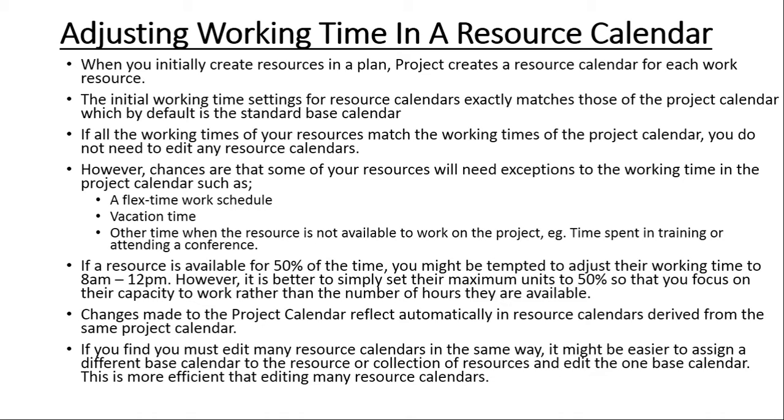So if you assign a specific calendar to a project, all the resources that you create also automatically get a calendar assigned as well. So in other words, project is going to create a resource calendar for every work resource.